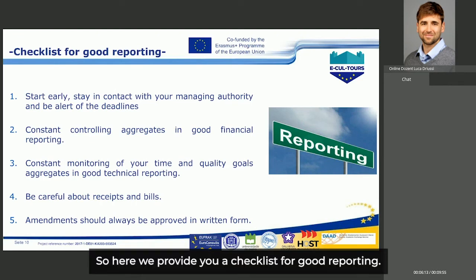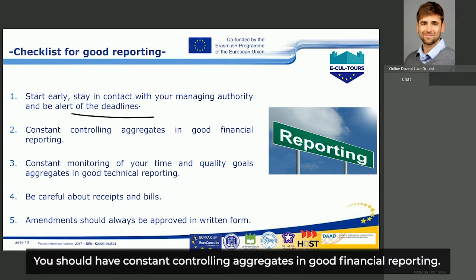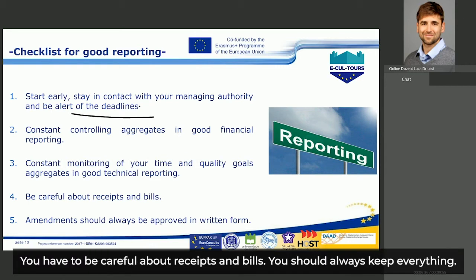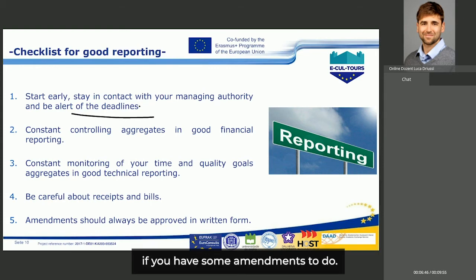So here we provide you with some checklists for good reporting. Start early, stay in contact with your managing authority, and be alert of the deadlines. Never skip the deadline. This is very, very important while reporting. You should have constant controlling in good financial reporting, and constant monitoring of your time and quality goals in good technical reporting. You have to be careful about receipts and bills. You should always keep everything. And amendments should always be approved in written form if you have some amendments to make.